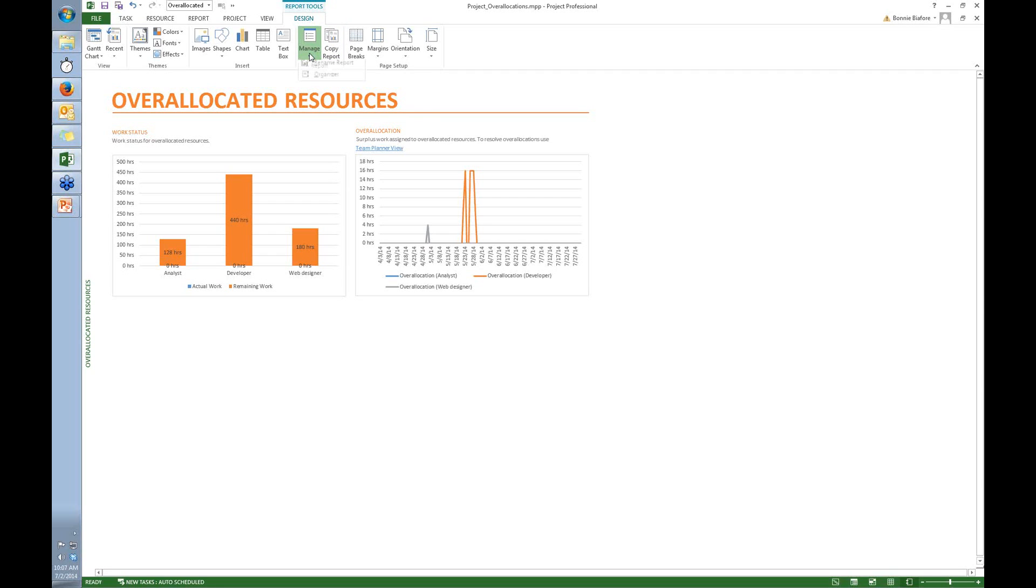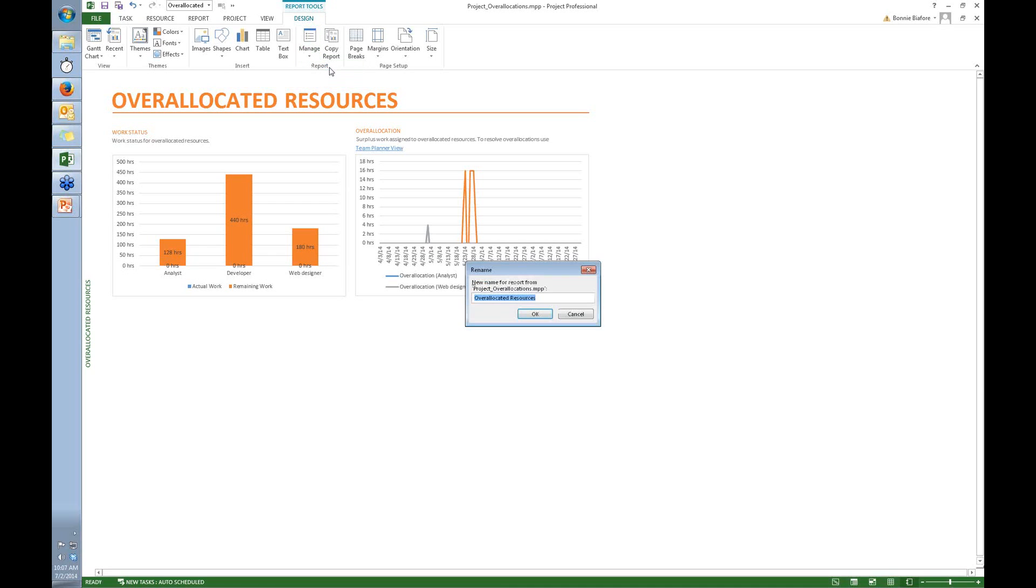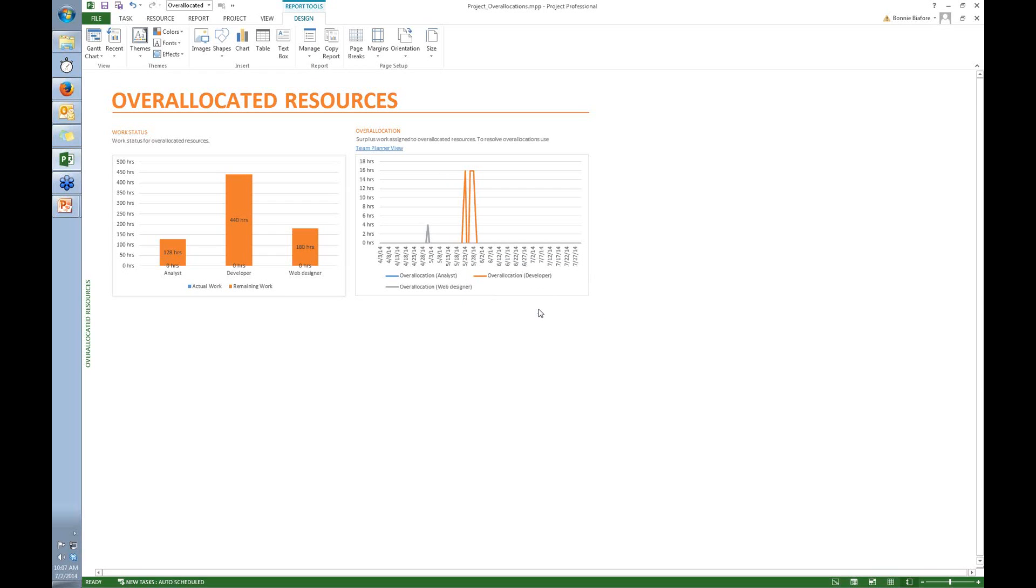So we click the down arrow, and what I'm going to do here is rename the report. Now this isn't quite obvious - I'm not renaming this built-in report. What I'm doing by renaming is creating another report with that name. So I click that, and I'm going to call this Find Replacements, and then click OK.